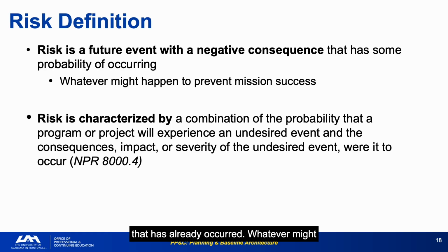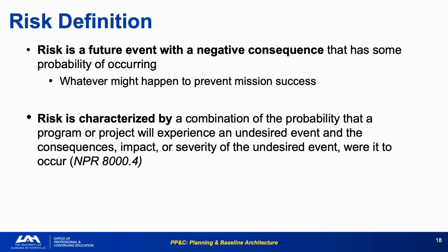Whatever might prevent mission success is the scope definition. Risk management should cast a wide net across technical, cost, schedule, external, and organizational risks, not just the obvious technical ones. Understanding the precise definition of risk allows analysts to correctly categorize events as risks versus problems, a critical distinction because the response strategies are different and the reserve implications are different.